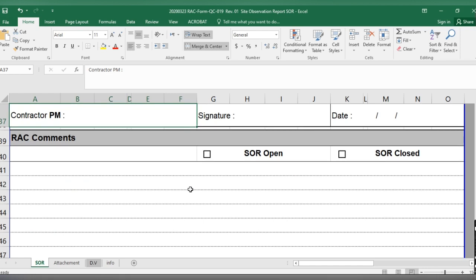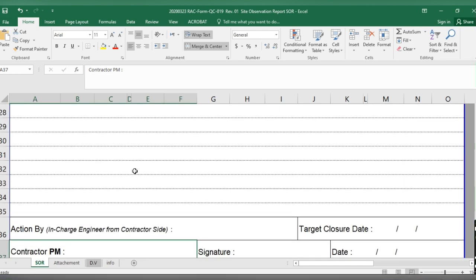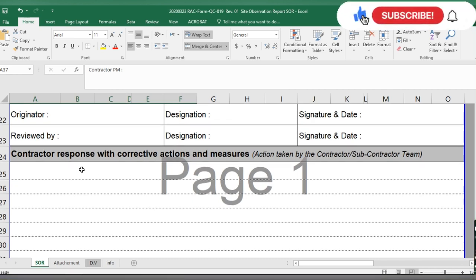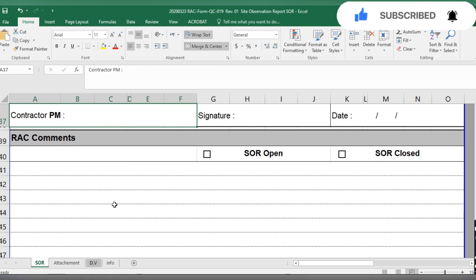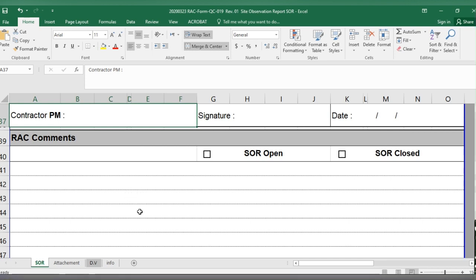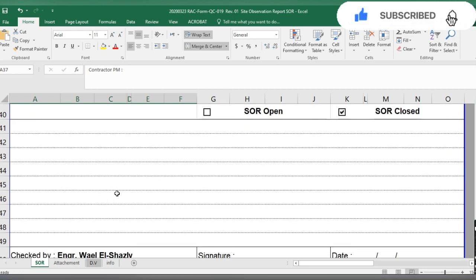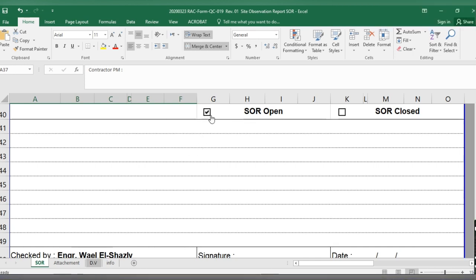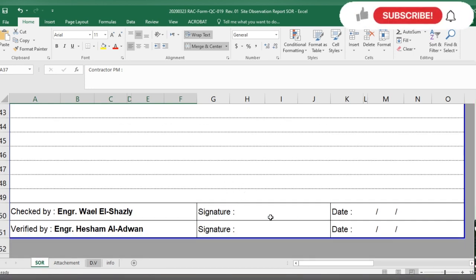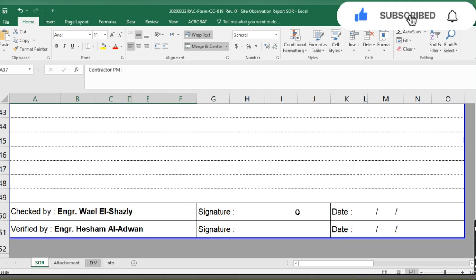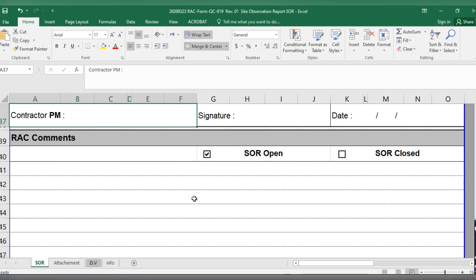When they close and resubmit the Site Observation Report with their response, you visit the site again and check whether the observations are closed. If closed, you mark it and write your comments. If the observation is still open and not completed, you write that the SOR is open, sign it, and resubmit it to the contractor, subcontracting company, or execution team.